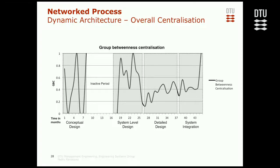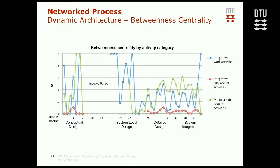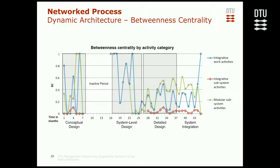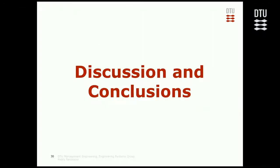In system integration, the overall centralization also went up. We can do the same experiment broken down by activity categories — integrative work activities, integrative subsystem activities, and modular subsystem activities. In the first two stages, integrative work activities were expected to be more dominant. Then in detail design, modular subsystem activities went up as expected. And in the last stage, there was a trend toward high information centralization through integrative work activities. This seemed to be a good indication of the robustness of the method, although it was just one case study.